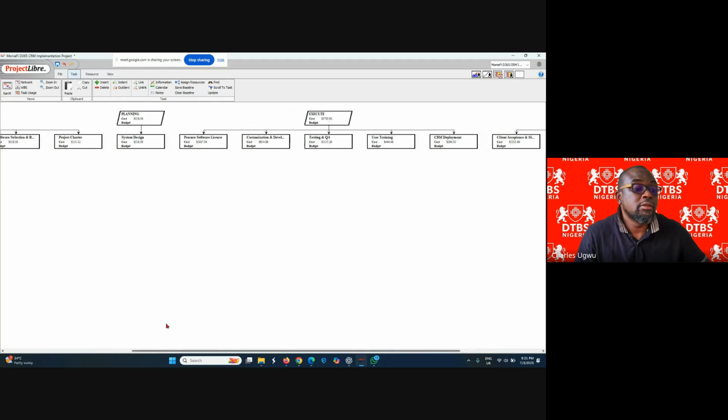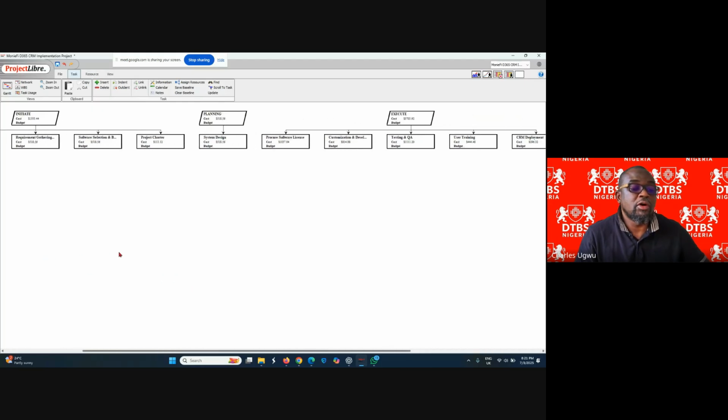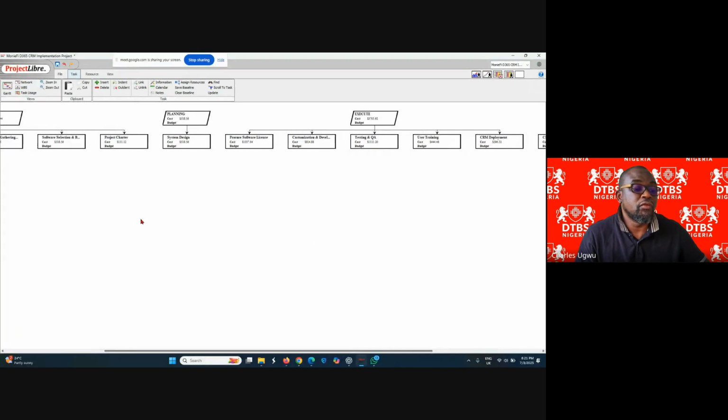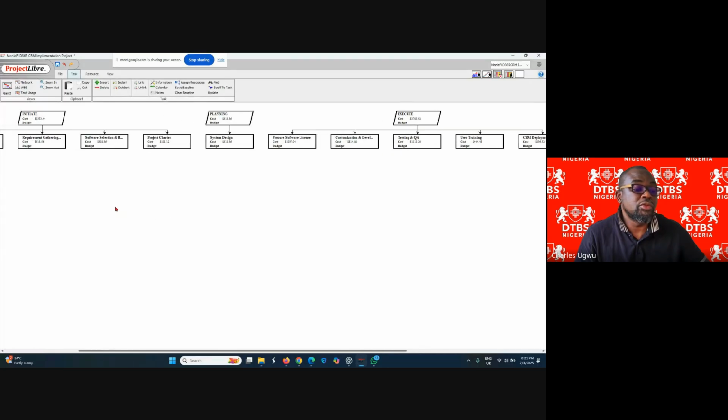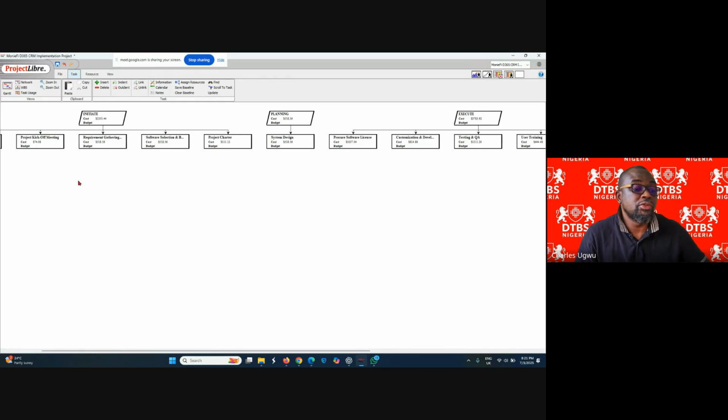And so when we add up all these costs, we see if we have overshot our budget. Say we're going to use 7,000. When we add all this up, if it's above 7,000, we can come back and start reducing.